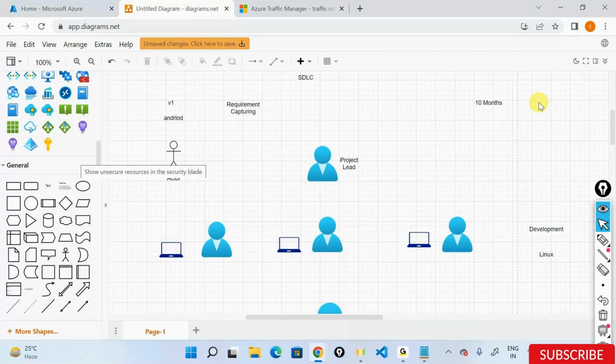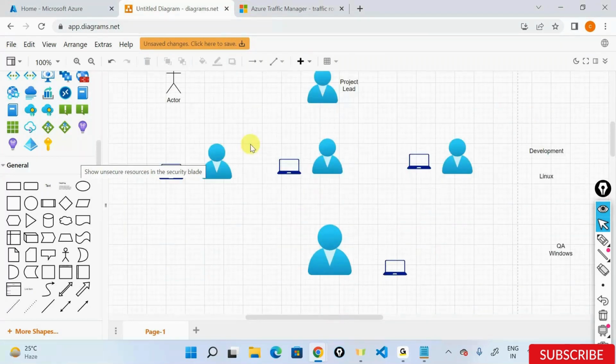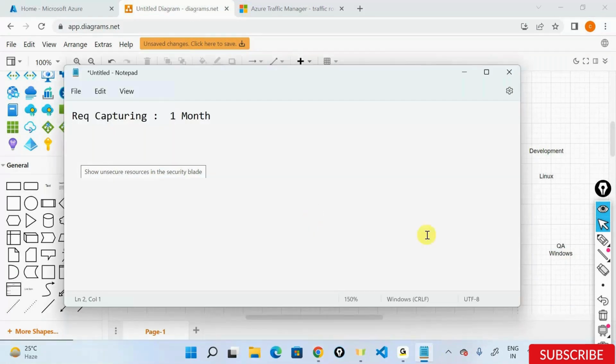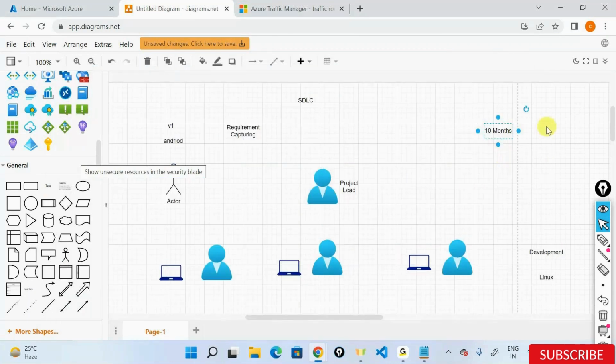After that, I need to hire a development team, keep a development team ready. So I will say hiring or recruiting my team to build the software. Let's give it a month. Recruiting, setting up their systems, a lot of things out here. A month out here. Graceful period, 1 month. I now have how many? 8 months remaining in my SDLC. In the 8 months, I'll have to develop, test, and also release the code to my client out here. Great, not a problem. Let's see this.